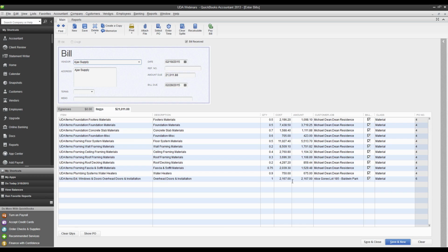And the other primary benefit to sending over your POs into QuickBooks is whoever is accepting these invoices and putting them into QuickBooks can immediately now recognize if an item went to the wrong job site, if we're being billed for something that we didn't order, perhaps, or if the quantities on these things are just wildly off. If we notice that some of these changes or adjustments are not to our benefit, it's an immediate red flag that we can then go in and revisit that invoice or contact the vendor and make sure that they didn't mix anything up. Now, this doesn't mean that the prices are always going to be exact. You can always come into these and adjust the prices a little bit after the fact if you need to.